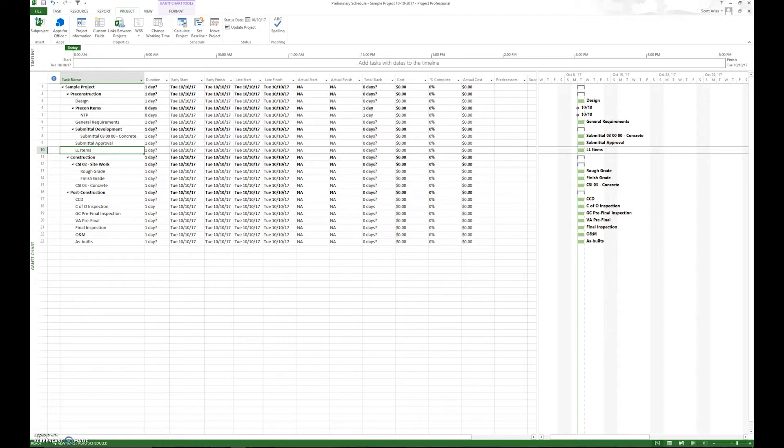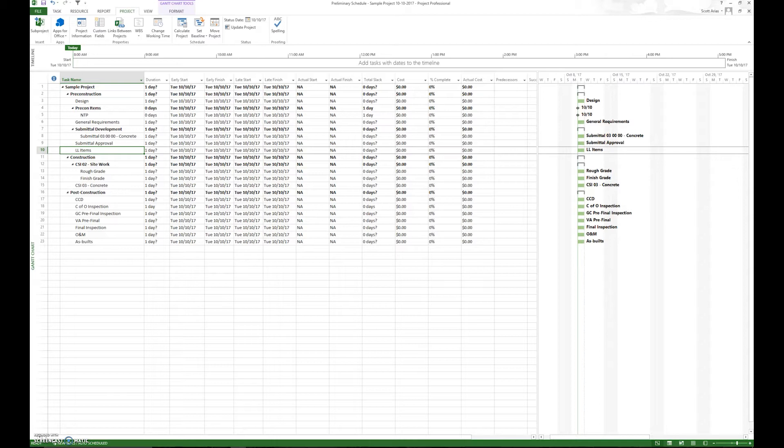An ideal activity should be between two days and 12 days. We don't want to have any activities that are in excess of 20 days except for pre-construction activities such as long lead items, submittals, those type of activities. But as far as construction activities, we want to have between two days and 12 days.